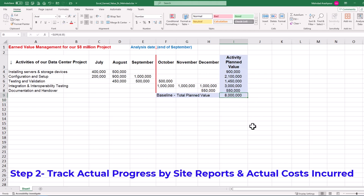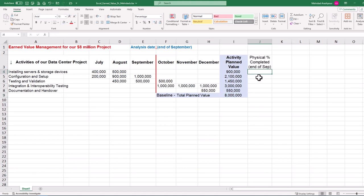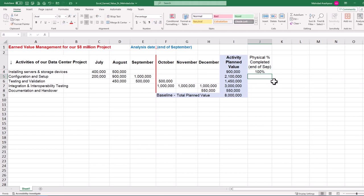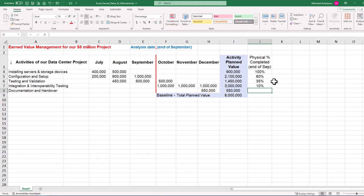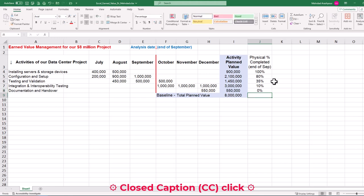Step two is to track the actual progress of project activities using site reports and measure actual costs incurred. We should monitor project logs and field reports to understand the actual progress rate of activities. In our project, the first activity has progressed 100%. The next activity of configuration and setup was meant to be completed by the end of September, but currently has only 80% progress. Testing and validation also have a lower-than-planned progress of 35%. Interoperability testing is ahead of its planned schedule, having 10% progress at the end of September.